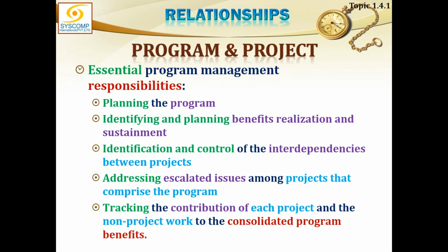Identification and control of interdependencies between the projects. Addressing escalated issues amongst projects that comprise the program. So all those issues which will not be resolved by the project would automatically be escalated up towards the program manager. So he will be dealing with them. Tracking the contribution of each project and non-project work to the consolidated program benefits.